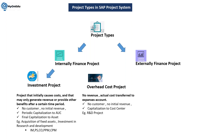In your business, based on NPV (net present value), internal rate of return, and payback period, all these things need to be calculated to find whether a project will be beneficial. For example, if you are staying on rent and paying 10,000 rupees per month and you want to buy a house in the same area, you compare your investment with the rent being paid, looking at how long it takes to recover your invested amount and how the investment appreciates over time — this is pre-investment analysis.